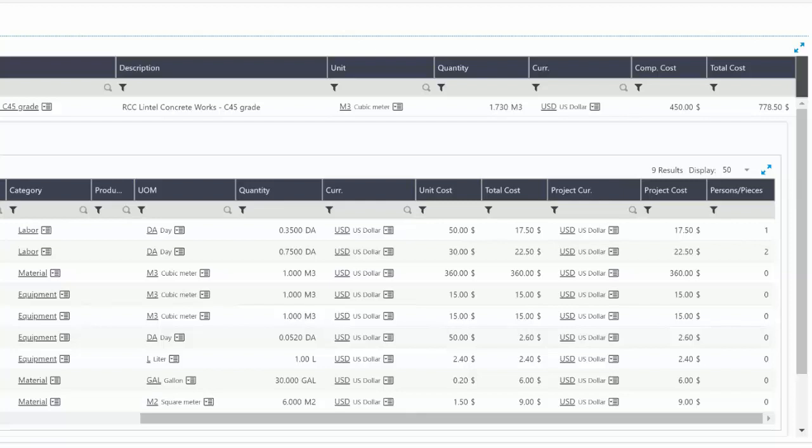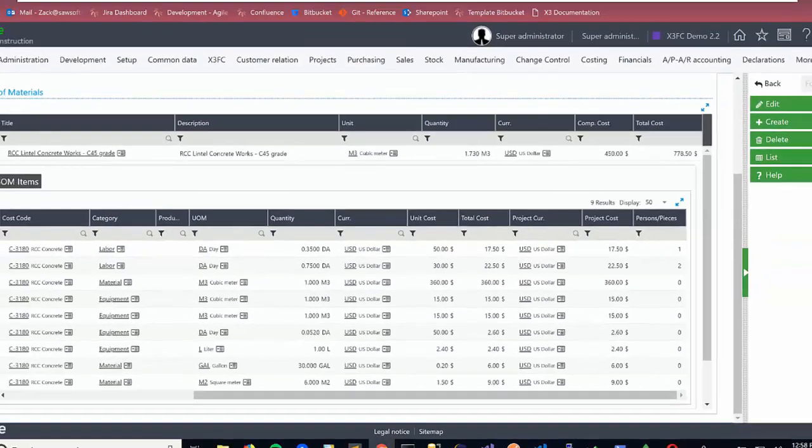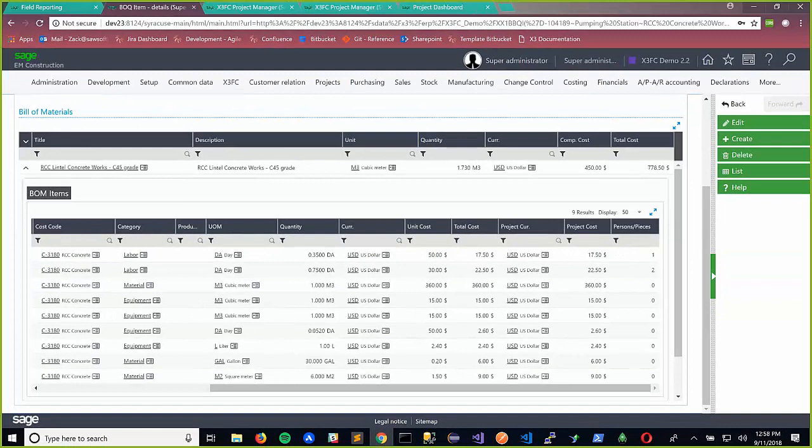What we're looking for here is how many people you are planning on, so that we can help you in doing your labor curves. We flipped it a little bit from the way it used to be, where it was quantity of people and then how much time per person. Now it's just tell me the total amount of time, and then also tell me your plan for how you're going to consume that time, how many people are going to be involved. I just wanted to point that out because it is kind of a reversal of the way we were doing it before.